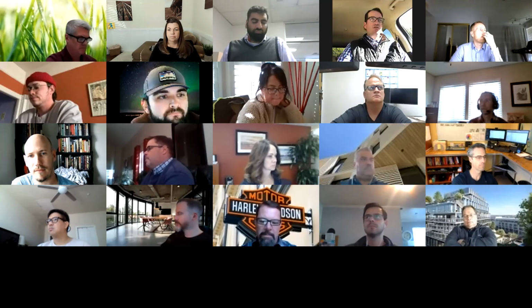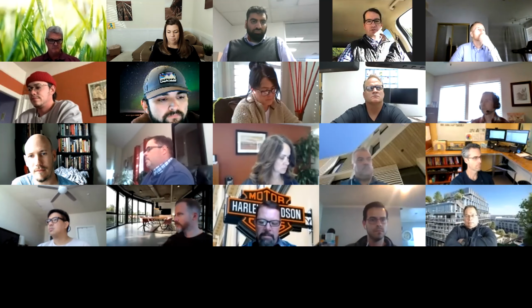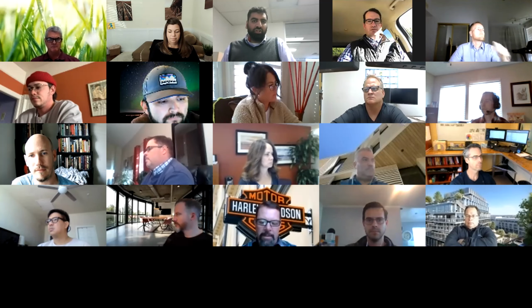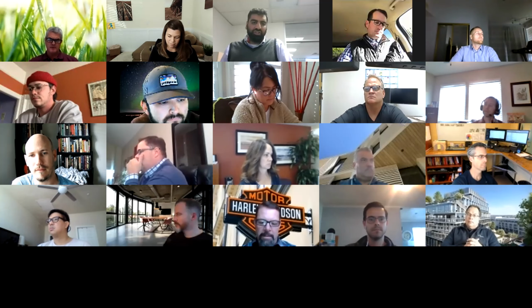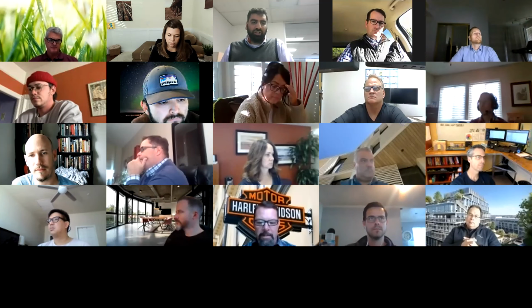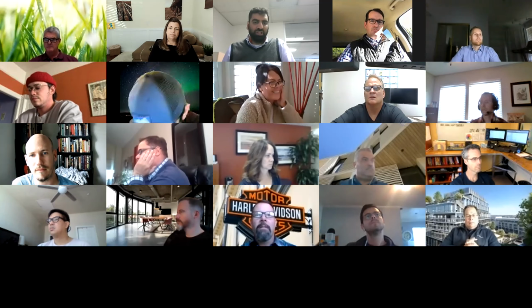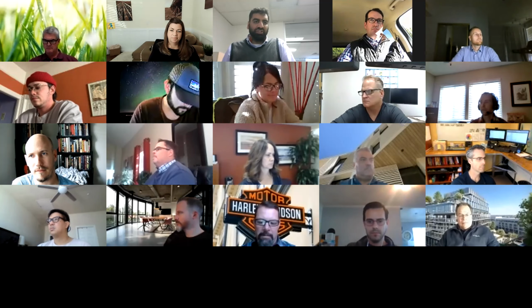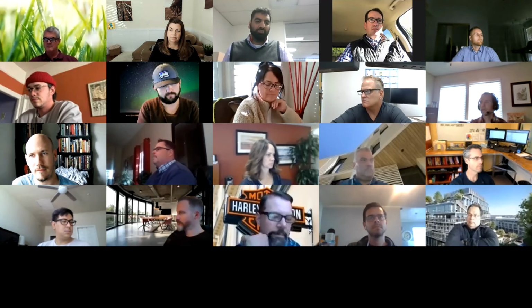Okay, and you guys aren't putting anything on the old normal job folder, Walters and Wolf servers? Everything's on Bluebeam now, you said? All the PDFs, obviously. The CAD drawings and stuff are still on the server. Because material orders tend to be combinations of spreadsheets and drawings, we've kept material orders on the server so they can be used. Like I said, spreadsheets haven't been great. We haven't found great ways to put spreadsheets on Bluebeam, because once they're up there, you can't really do anything with them apart from download them.